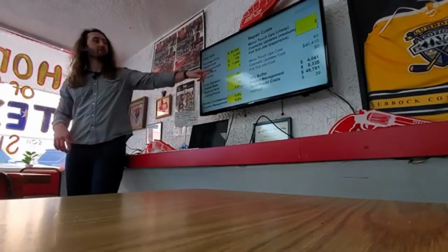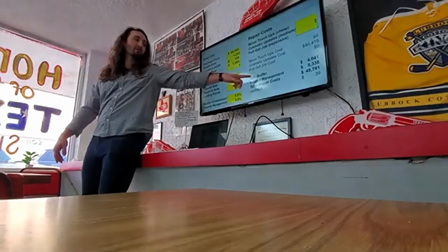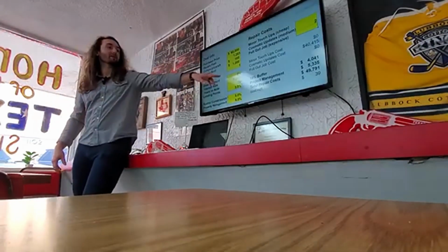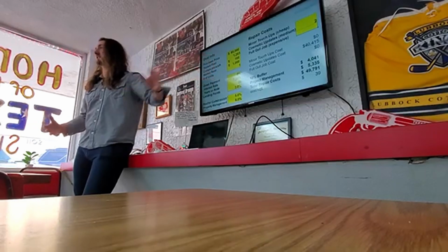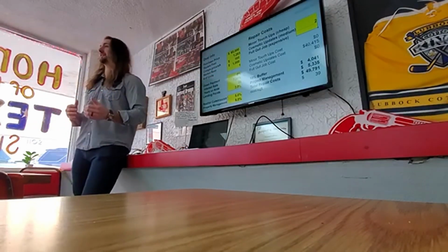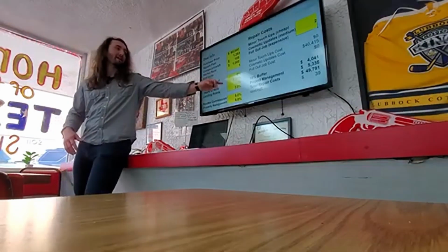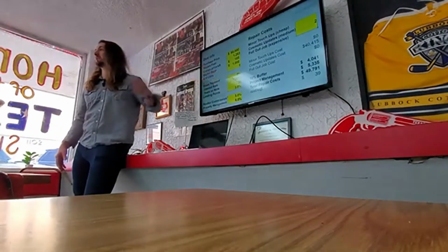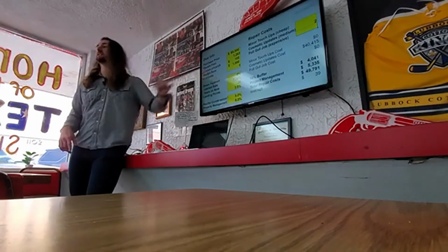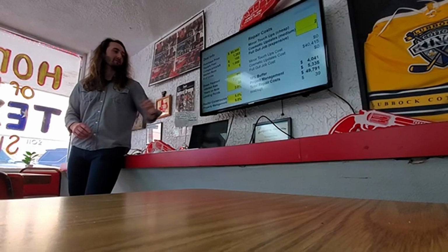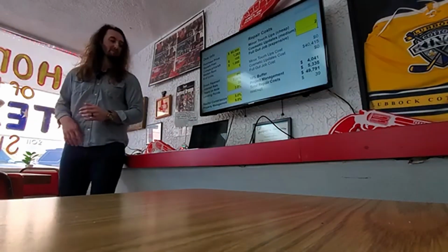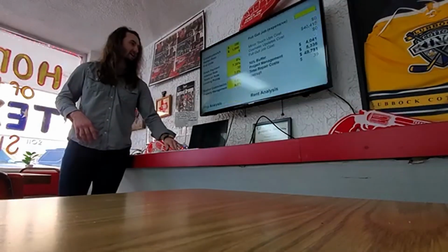So like we looked at earlier on my calculator, we've got a 10% buffer and we've got project management costs. So if I'm looking at this deal, I'm going to be looking at about 49,000 in repair costs on this one. And the bigger the project, usually the more hidden stuff that always pops up. These are my financing terms. This is just one of the lenders we're working with: 7.3%, 30-year amortization, 3 points, kind of standard. And then if you go to sell, 5% commission. You keep it as a rental, 8% property management. So let's see what this spits out on the calculator.